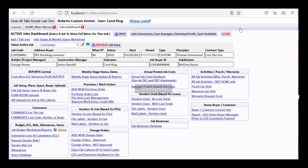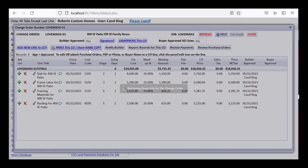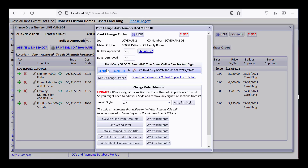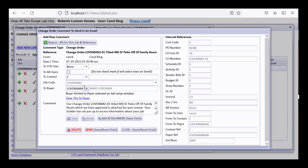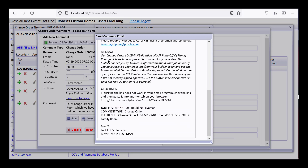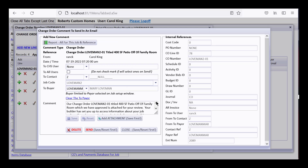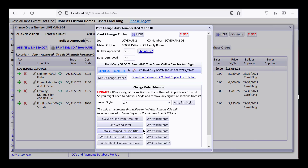Now, going back to the change order, clicking 'Print Store Hard Copy' and then 'Send CO' opens a comment pre-addressed to the buyer. The buyer would receive a message saying a change order is attached and instructing them to log in using their builder-provided credentials and click the 'Change Orders' button to review and sign.